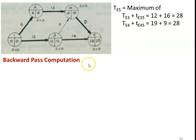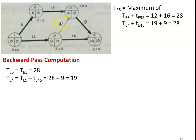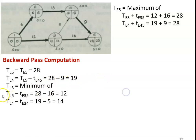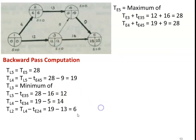Now we use the backward pass computation to calculate the latest allowable time. TL5 is fixed equal to TE5 = 28. TL4: there is only one outgoing arrow, TL4 = TL5 - t(4,5) = 28 - 9 = 19. TL3: with two outgoing arrows, TL3 = minimum of (TL5 - t(3,5)) = 28 - 16 = 12, and (TL4 - t(3,4)) = 19 - 5 = 14. The minimum is 12. TL2 = TL4 - t(2,4) = 19 - 13 = 6.